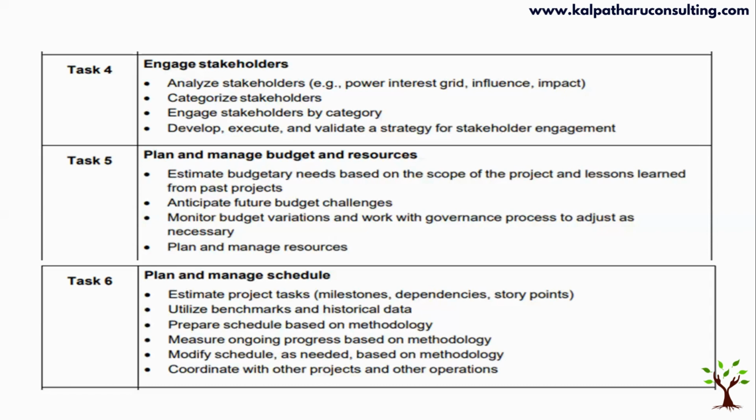So basically, again, referring to PMBOK 6, it speaks about how you come out with a plan, the schedule management plan, and then you are going to define activities. You're going to refer to the WBS and then further decompose into activities, and sequence the activities. That is where you're going to refer to your dependencies. There are various methodologies used to sequence your activities and then you come out with a network diagram. You're going to use various methodologies when you're going to do this, which is defined in your plan. Your plan should be a complete one, which is going to give answers to all the questions raised during the project.